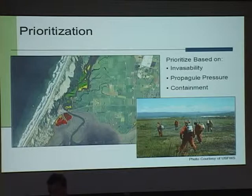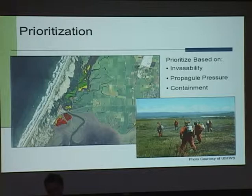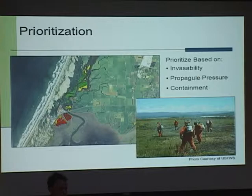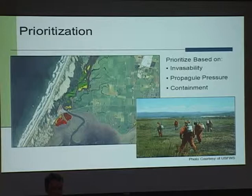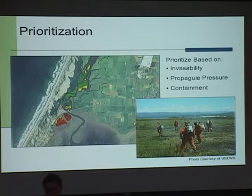Given the uncertainties about the timing of funding and the effectiveness of different methods, reprioritization is critical. If we got all the money we needed at once, there'd be no reason to prioritize — we would treat everything. That may not happen, so we're going to have to reprioritize continuously into the future, perhaps every year: looking at what Spartina remains, what methods have been working best, how much funding is available, and where willing landowners are. There are lots of different factors to consider.